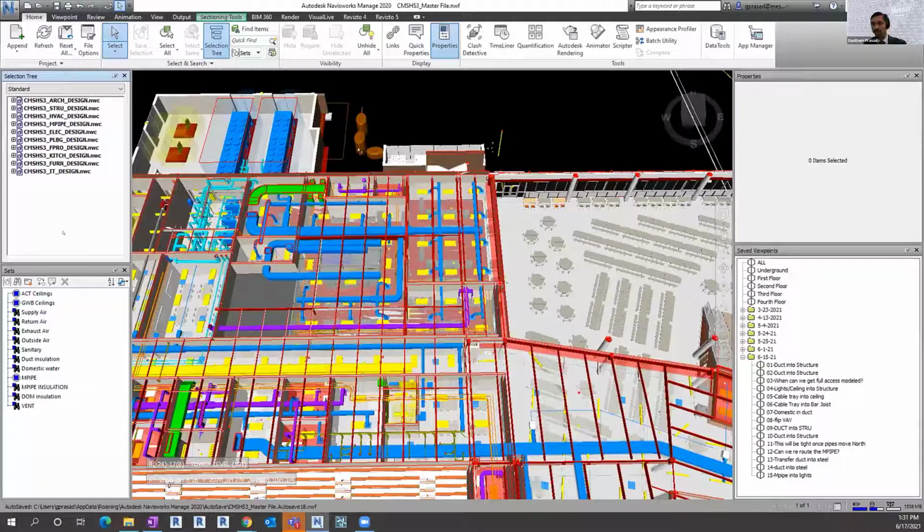Okay, so as Heather mentioned, CMS, Charlotte Mecklenburg Schools, has a pretty robust BIM standard. Some of it doesn't make a ton of sense. They ask for a clash detection log, which has fields for, at a minimum, clash number, clash location, column line intersection, trades involved, recommended solution, and they want you to do that for every clash, which could be thousands. So I said, gosh, guys, can we do this another way? And eventually we got them to what we're doing now.